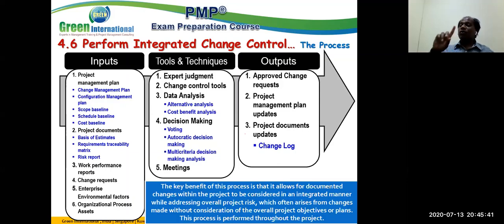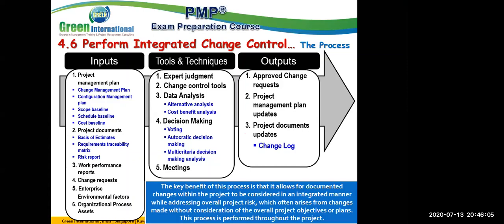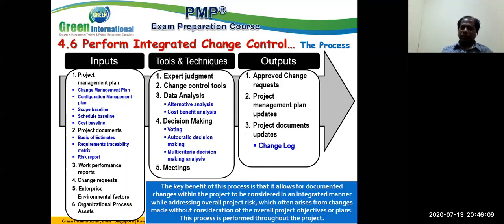So in this case, you are going to change the management plan. You are defining that the progress has to be measured weekly, based on the current analysis of the project performance. So you will change the schedule management plan. So the changes to the schedule management plan will happen, meaning you are thinking about how you are going to manage the schedule throughout the project life.